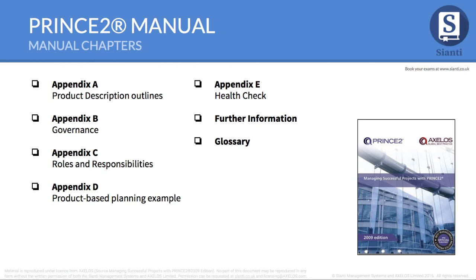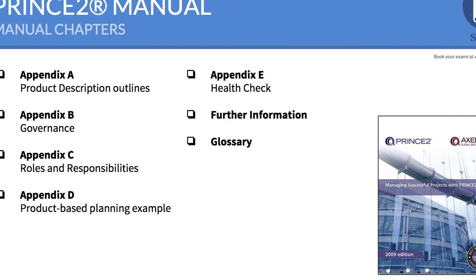Everybody in a Prince project has a role description for the project. The intention is that everything that we need to do is part and parcel of someone's role description. Appendix C gives you a set of template role descriptions as a starting point. Again, you will need to modify those for your organisation. You might need to switch responsibilities around, and for particular projects you might want to switch responsibilities around depending on the interests and knowledge of different team members.